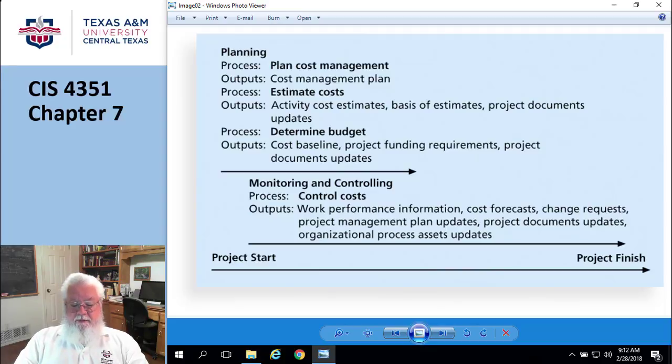So life cycle costing, typically, for example, we talked about net present value in the previous chapter. If you spread it over 10 years, let's just assume that the life of your software project is going to be 10 years, then you're just spreading that over, and that's going to be your life cycle cost. What's the total cost of everything?